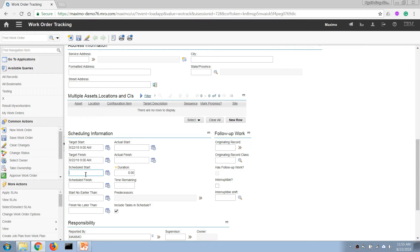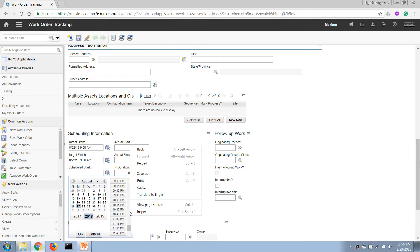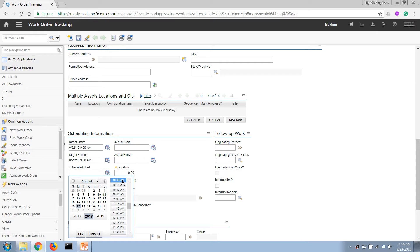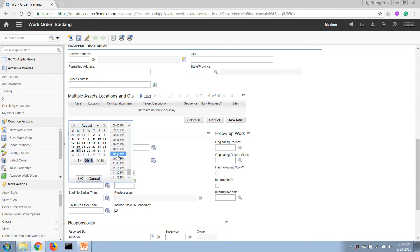If the work order is assigned to a scheduler, they will define a suitable time to start the work and enter the scheduled start date. For example, Maximo generated the PM and told us to start by the 22nd of August, but our team is busy, so as a scheduler I'm telling Maximo this job will start next week — let's say at 10 a.m. — and finish the same day at 11:30 a.m.